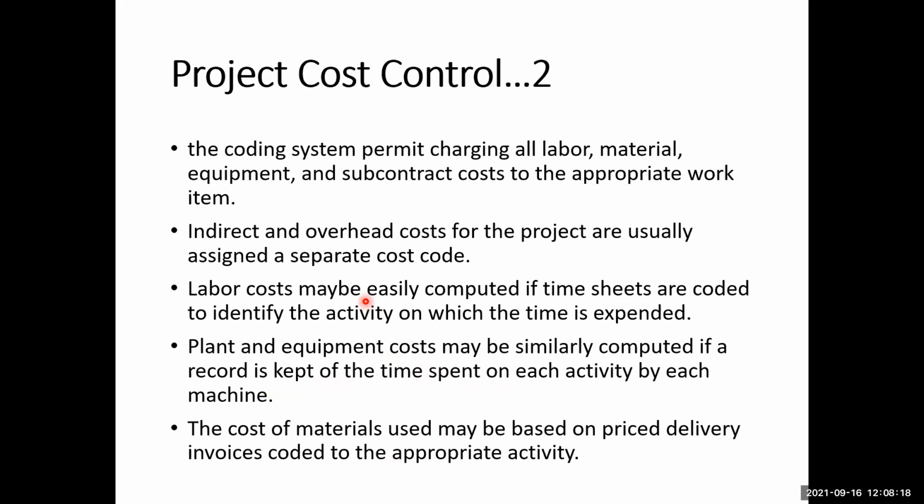On the other hand, material costs are controlled in a slightly different manner. The cost of the material used may be based on priced delivery invoices coded to the appropriate activity.